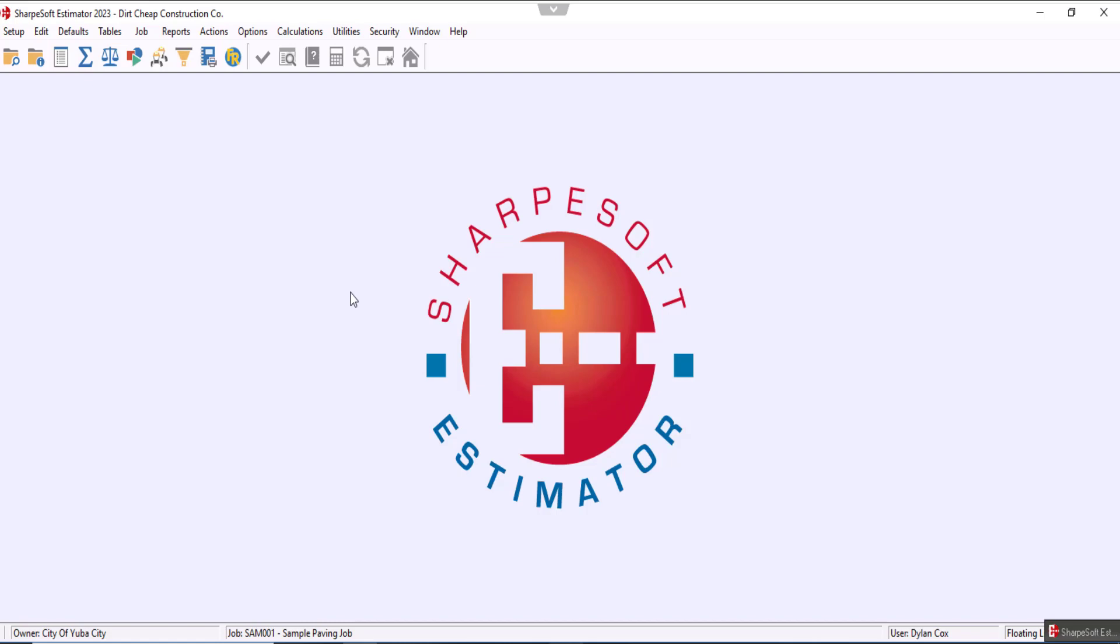One of the main differences between exporting from the cloud environment and exporting from on-premise is that the cloud does not actually have Microsoft Project installed on it. So what we're going to have to do first is export the project as a generic file type which will be called .xml.